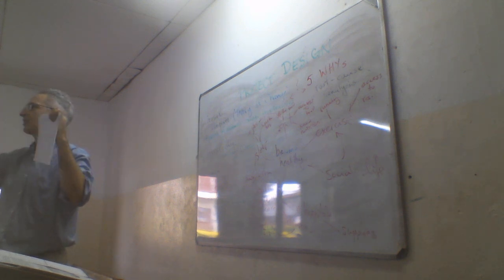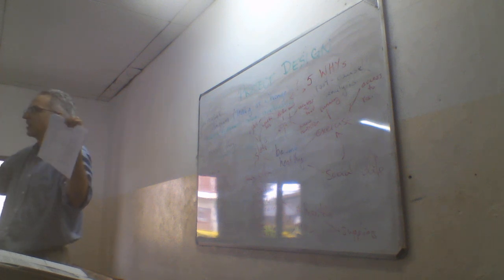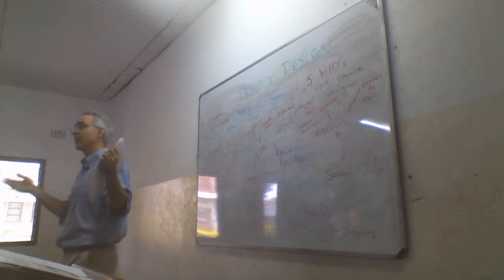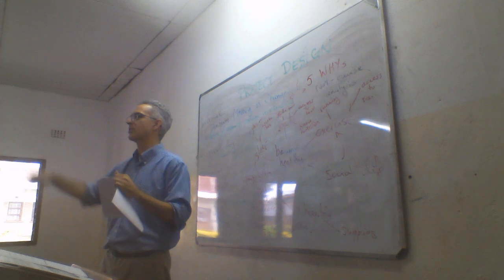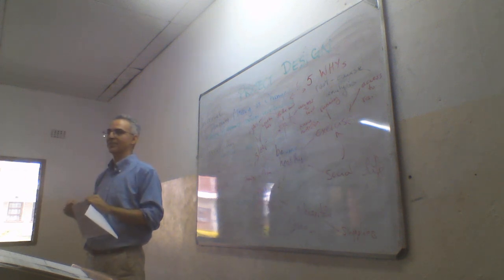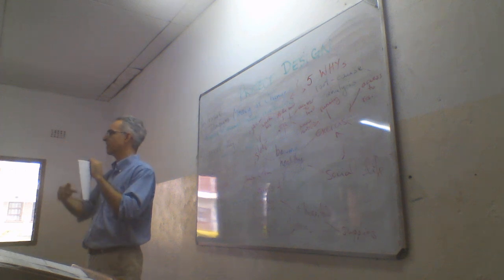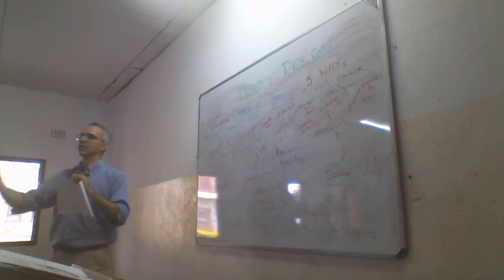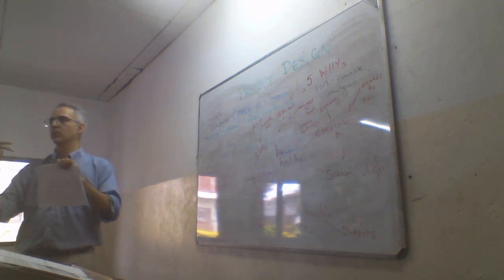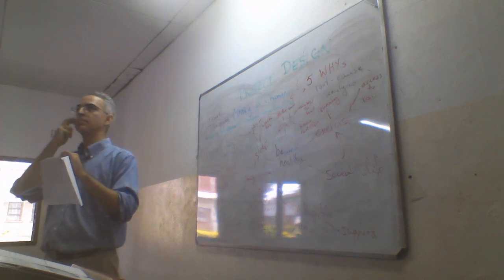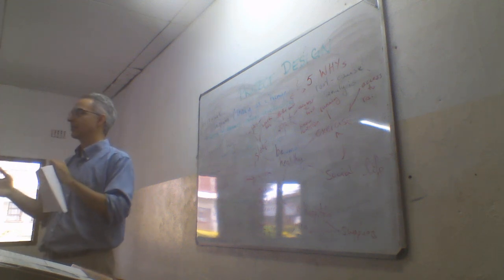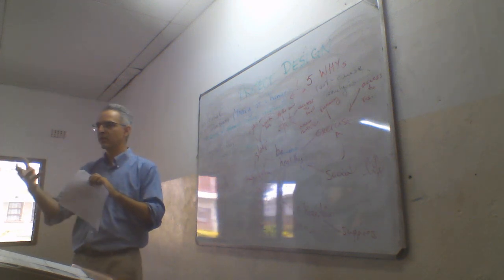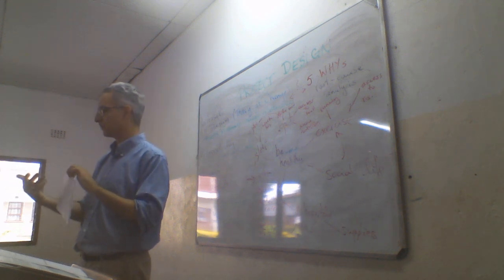You don't do help the community. Go do health. Go improve health. What do you want me to do? But if I tell you, go train 10 nurses, I can do that. It's an action. The activities are the actions we take. Right? We will train people. We will build things. We will organize. We will upgrade. We will educate. We will sensitize. We will raise awareness. These are the things we do.